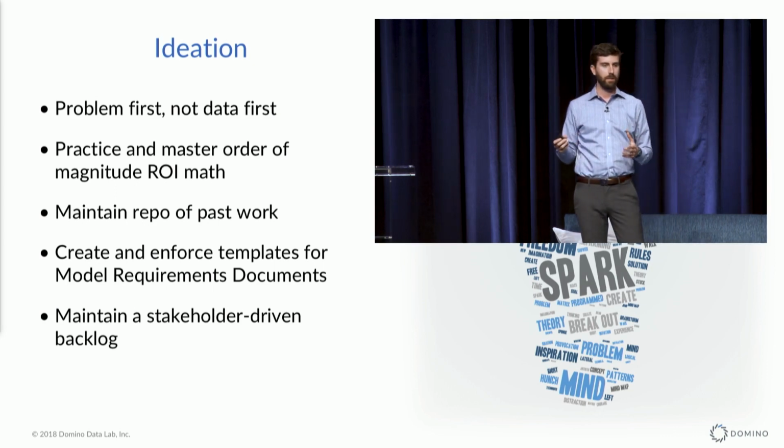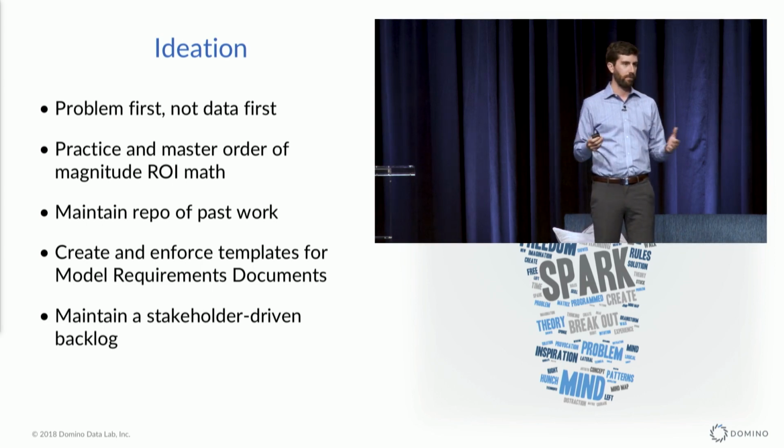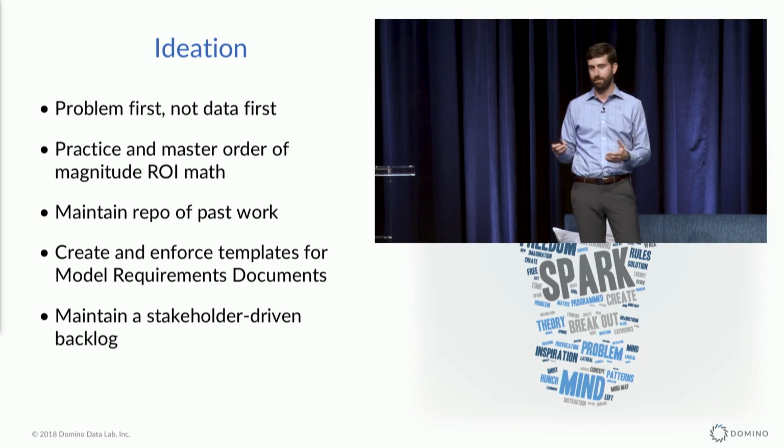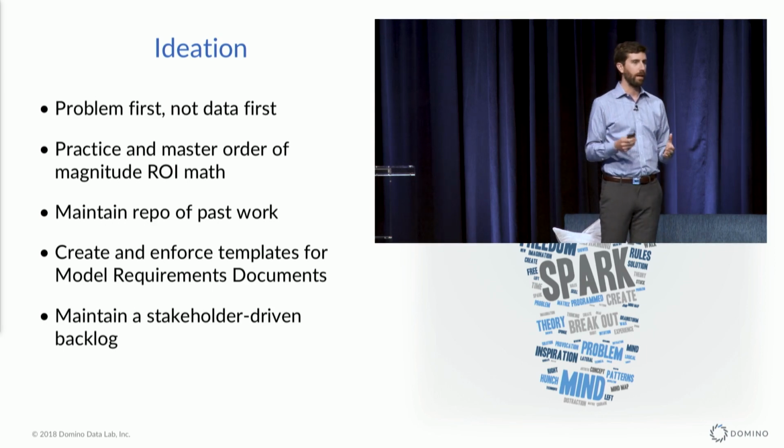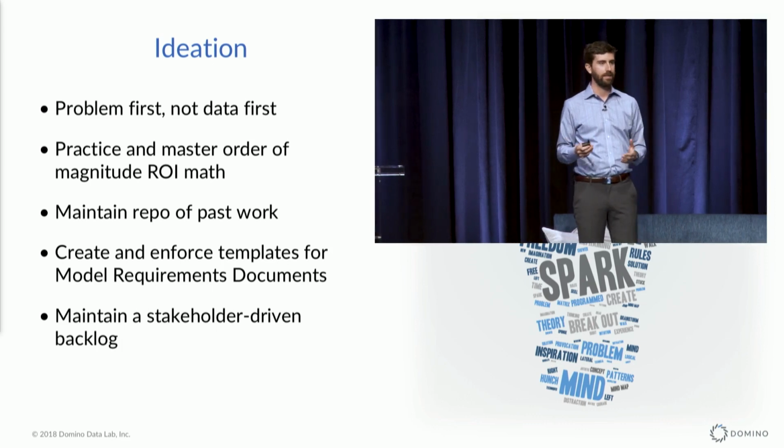And so some of the great data science teams we've seen have practices of estimating the ROI of a project up front. And it doesn't have to be exact. This is probably an analytically rigorous crowd here, but I like to think of this as back of the envelope math. If we solve our churn problem, is it $100,000 of gain, $1 million of gain, $1 billion of gain? People often overlook that and just want to work on the interesting problem without necessarily thinking about the business implication. That also goes for the cost side as well. Is this going to take me a day, a week, a month, a quarter? It doesn't have to be exact, but going through that process in advance helps mitigate the risk of a project going off the rails.